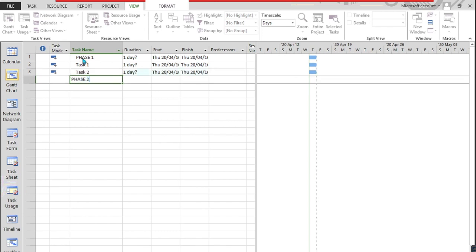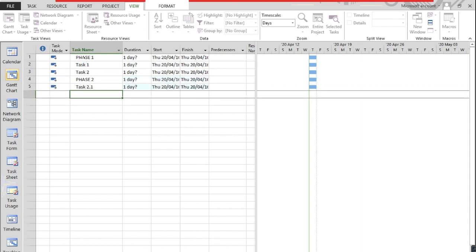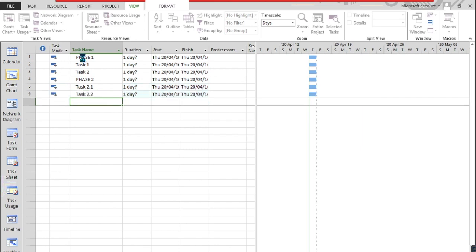Phase 2, Task 2.1. Please note that we never name a task the same as another task, although a project would let you do it. And here I'm closing the project, and always closure of project is indicated by a 0-day duration.